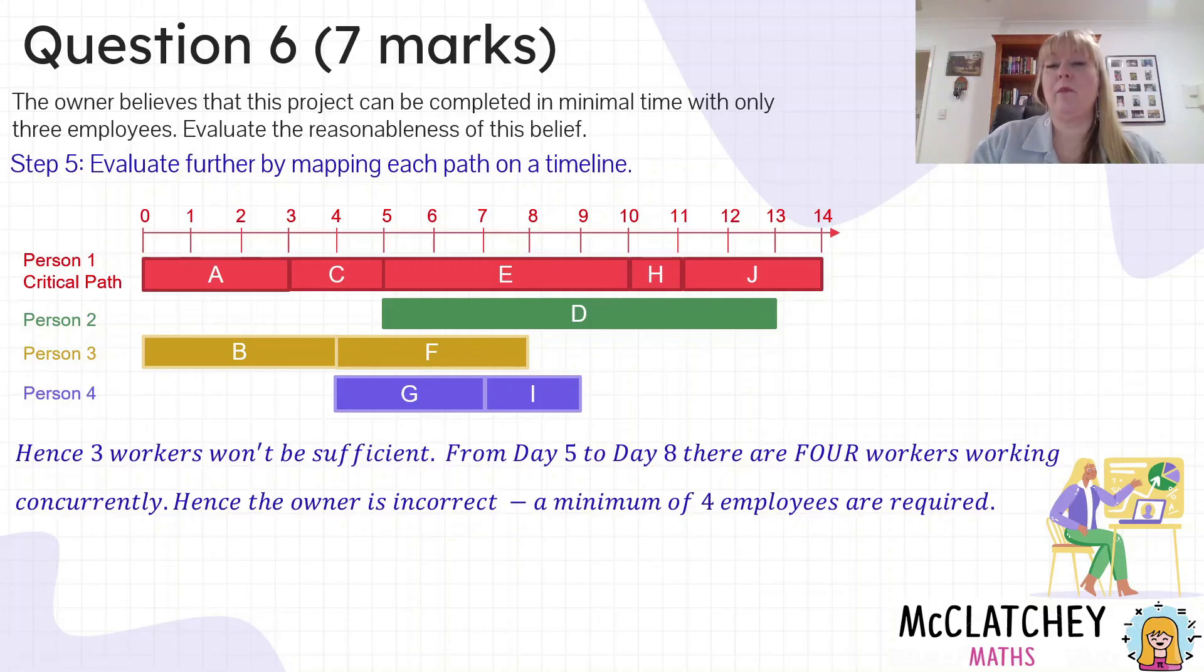So I would highly recommend if you're having to make decisions on how many people to use within a network, you actually map out the work on a timeline. Hence we need to write a statement now that we've evaluated. Three workers are not going to be enough. From day five to day eight there are four workers all working concurrently. Hence the owner is incorrect, and we need a minimum of four employees to do this project. That got us another mark for evaluating that at the end. We also got another mark for saying that we need four employees. So it's not enough to just say no, three is not enough, he's wrong. You've also got to say how many are actually needed, and that gets you the next mark.